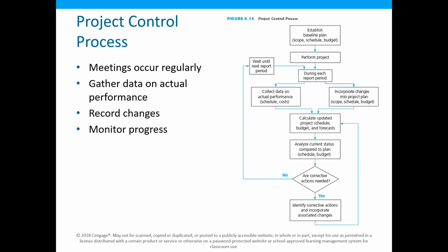Say, for example, if the project is going to take 2 years duration, then it may be acceptable to have the reporting period, let's say, after every month. But if the project is for a few months long duration, then it may be better to have the project reporting after every week.